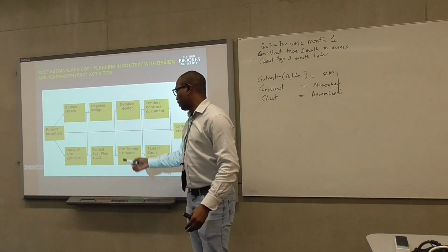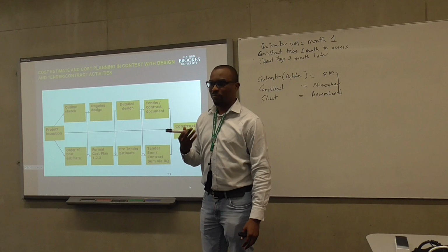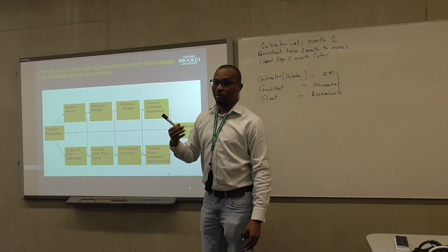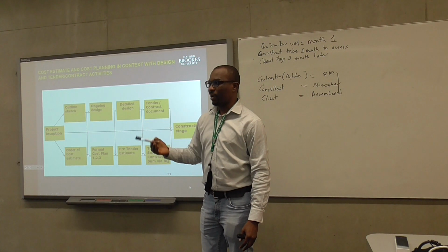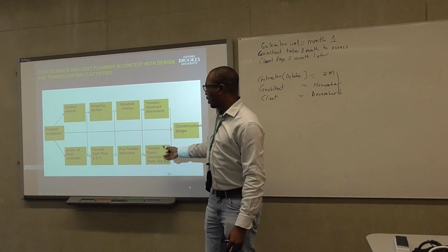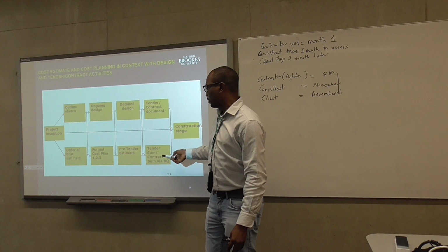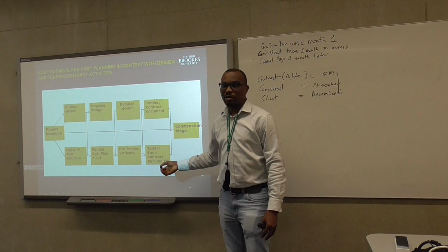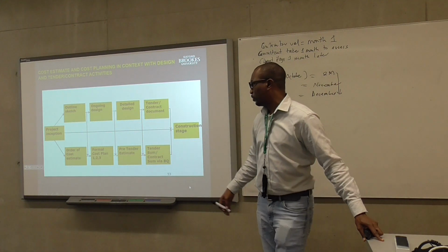And based on that, you can come up with a fair idea of what the pre-tender estimate is, what a project is likely to cost you. But that doesn't mean that's what you deliver it at, because you are not a contractor and you do not know the contractor's margin or profit. So the contractor at tender, once you submit your tender document and contractor's tender, that's when you come up with your tender or contract sum, where you negotiate the final contract sum by which the project will be delivered.